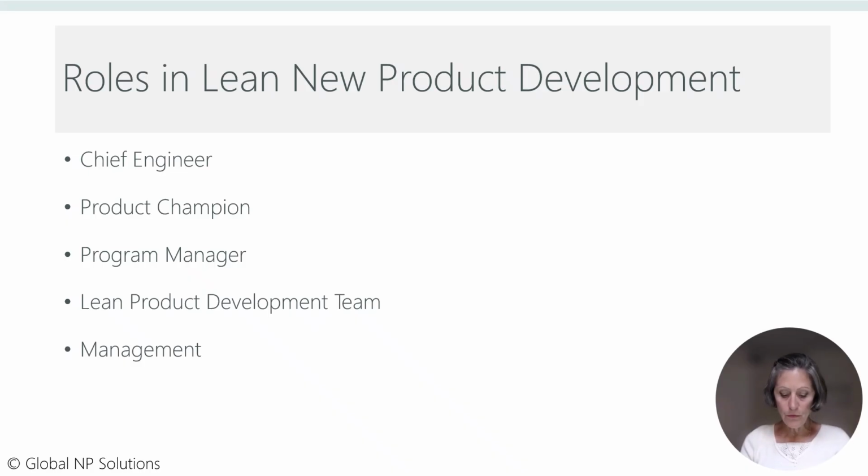When team members shift from front-end design to engineering, they should be reassigned to the next project. Holding team members longer than necessary on a project leads to boredom, while not having enough skilled staff on the NPD project leads to a chaotic work environment. Using product portfolio management effectively, senior management maintains flow for Lean new product development projects. The chief engineer and program manager analyze data from historically similar projects to estimate the number, type, and skills of required resources for most new product development efforts.